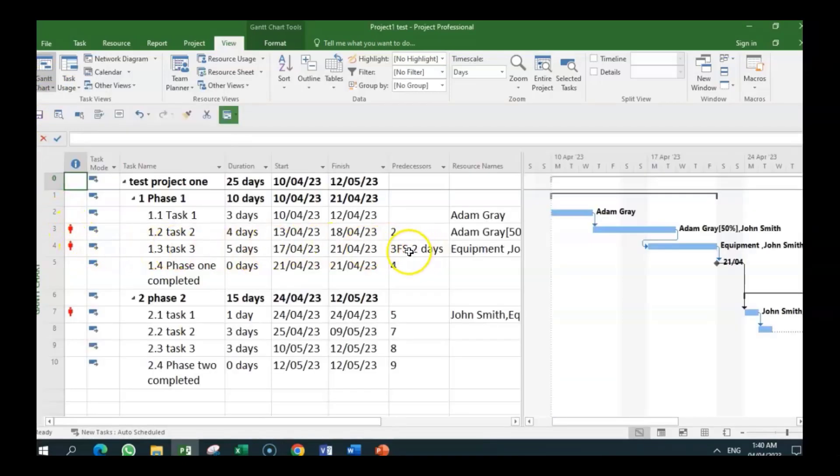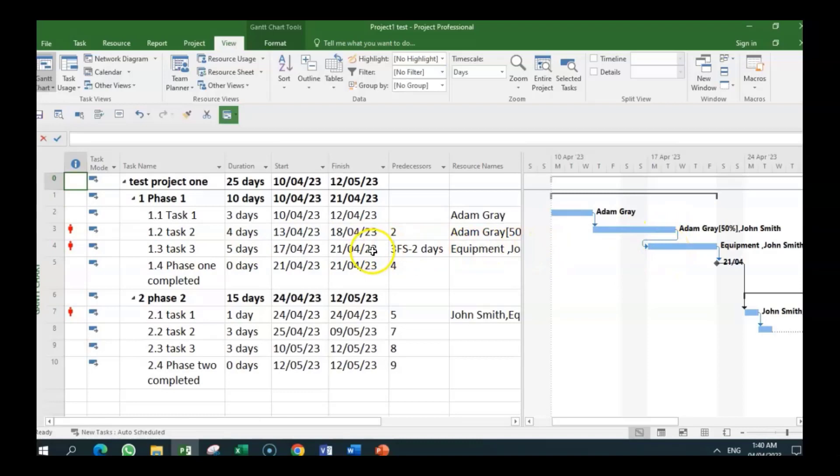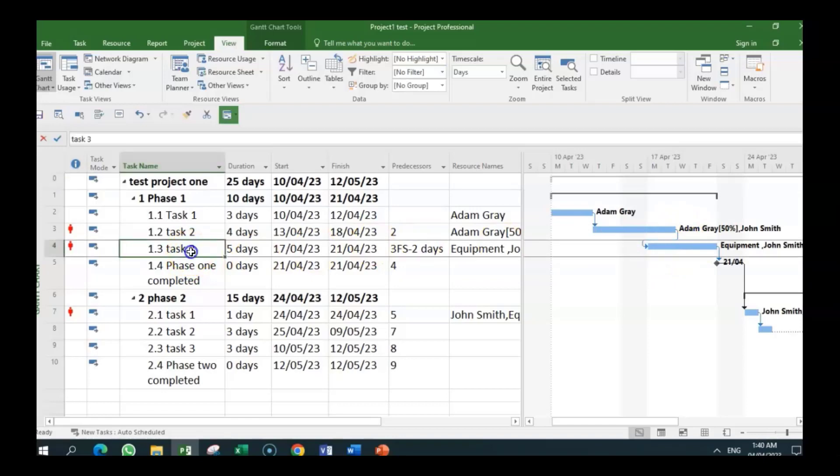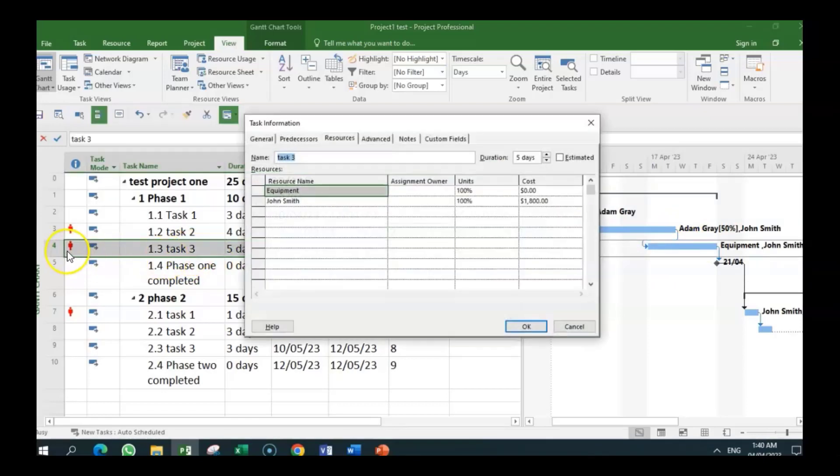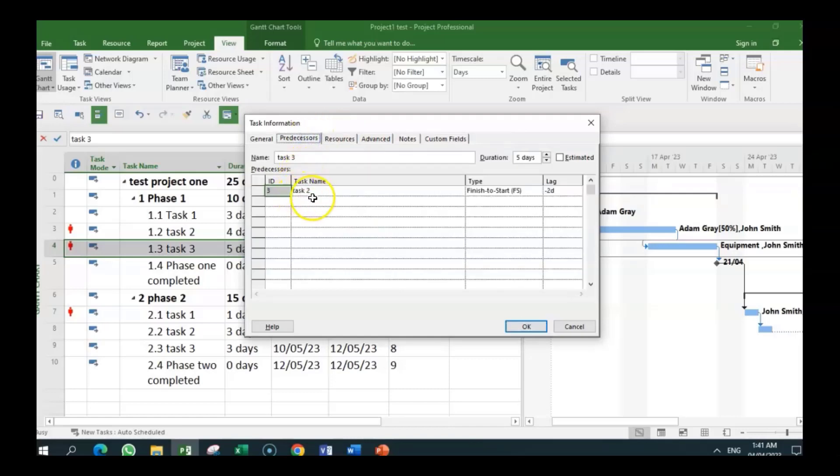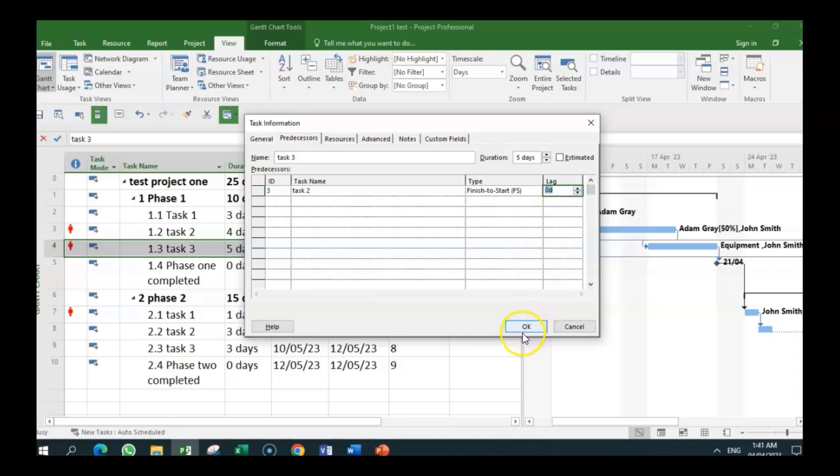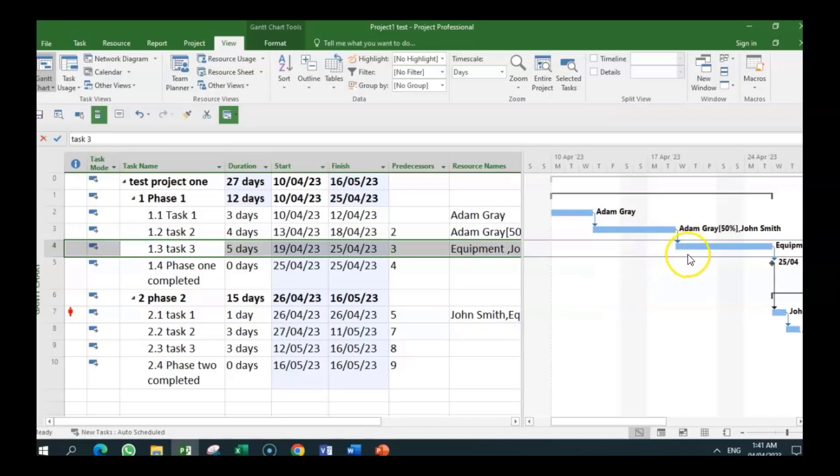So let's go back into the Gantt view and see if we could resolve the situation. Let's look at it again. What we can do is change this relationship. Right now we have task three with a finish-to-start with a two-day lead. So before this one is finished, this one starts. So we can double-click on task three. And I want you to continue to look at the over-allocation situation, and we can bring in John. We are going into predecessors. So we are looking at task three. One of the things we could move is the lead. Minus is a lead, plus is a lag. So we move the lead and we click, and you realize what has happened.